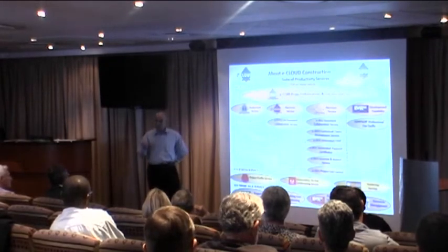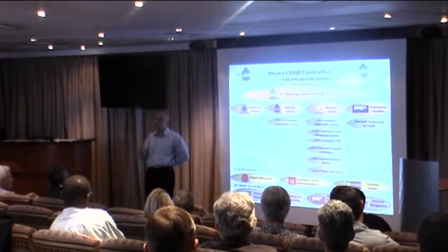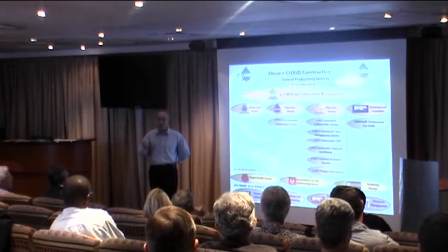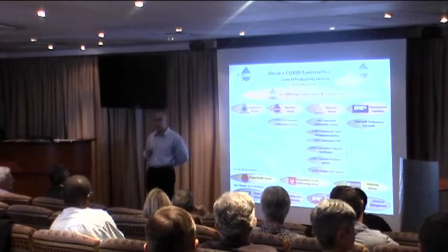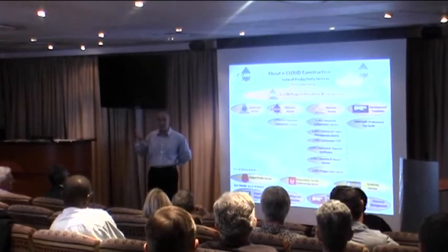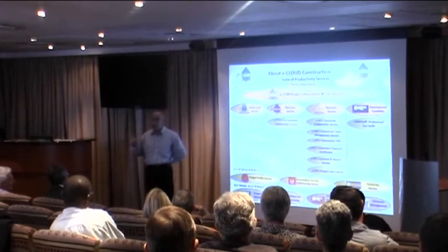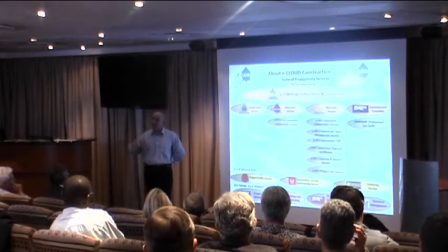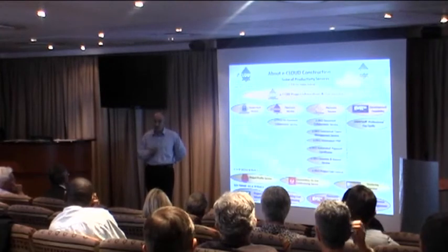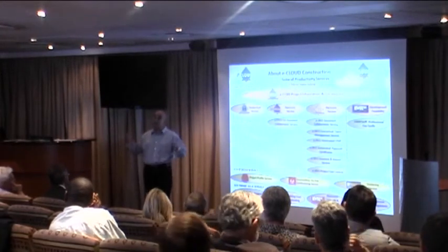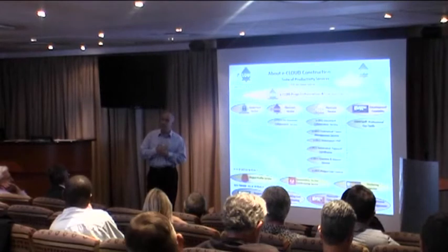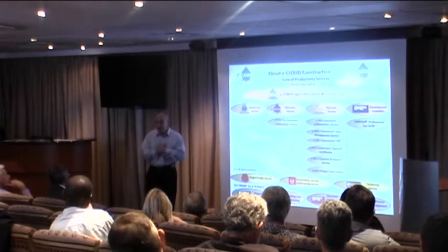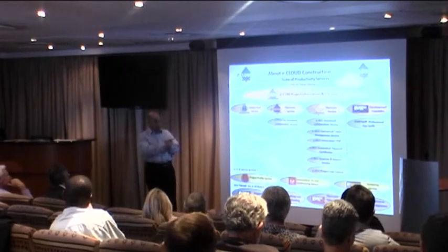That is the basis. It's got all the steel tables built in, so if you're measuring steel, you'll click, click, click, and tell the system what kind of material, is it an I-beam, what size. It will do the conversion for you and pump the results out into Excel so that you've got your quantity. So it's very useful for marking up a drawing, for taking off areas, measurement of foundations, linear, area, number items, very quickly rather than the long-handed approach of how we measure manually. It's really just a digitizing exercise on screen.